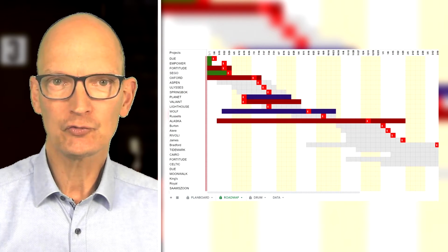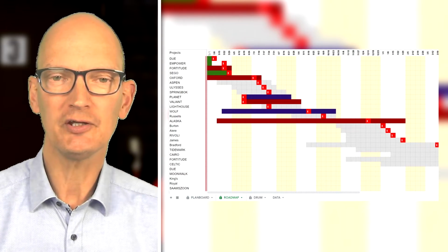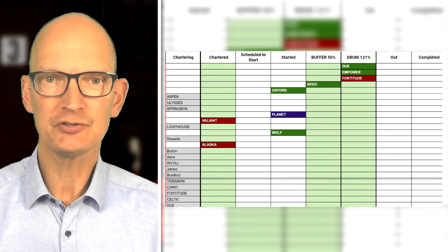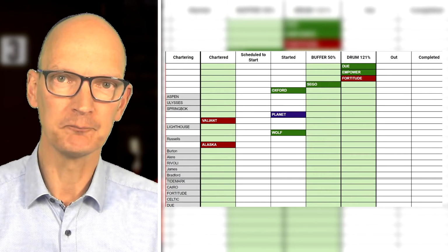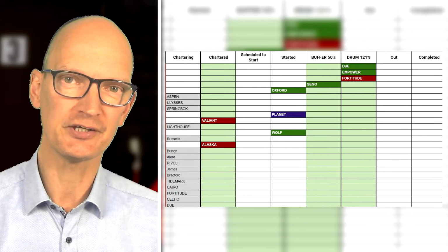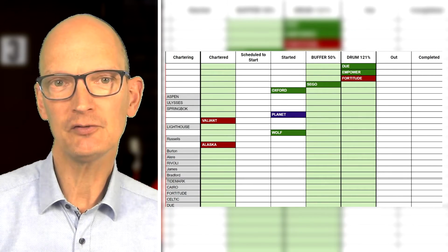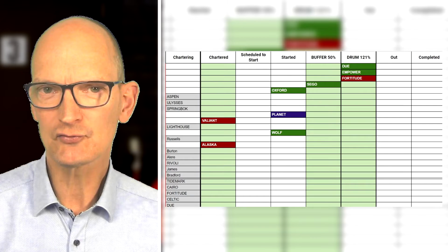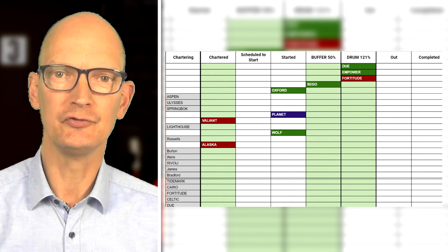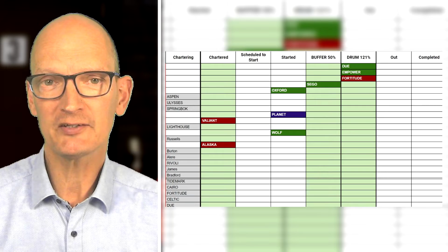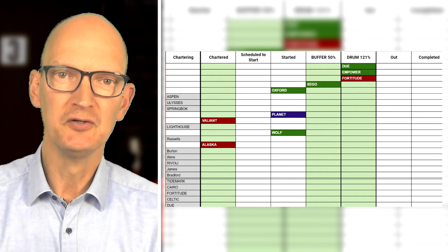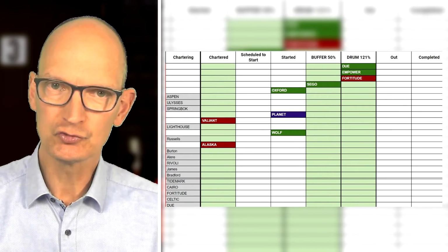For day-to-day use by project managers and team members is the project's plan board. And that shows where projects are currently in the pipeline. On the left is the sales funnel, to the right is where projects get completed. And in the middle is the bottleneck. And instead of talking about the bottleneck, it is tradition to talk about the drum. And it is common practice to place a buffer just before the drum to smooth the flow, to smooth the